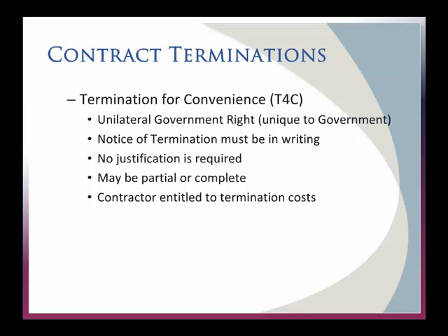If they've sunk a lot of money into something with the anticipation that there is follow-on money coming, we have to allow them, whatever the costs are, for them to extract themselves from that arrangement. They're allowed to do that. Because remember, this is not an unauthorized obligation. They were working in good faith that the whole amount of money that we agreed on was coming. And now you're telling me it's not coming. So now I have the right to unwind myself from that, so at least I don't lose money, potentially put my company out of business, simply because Congress made a change in budgets and your money went away.